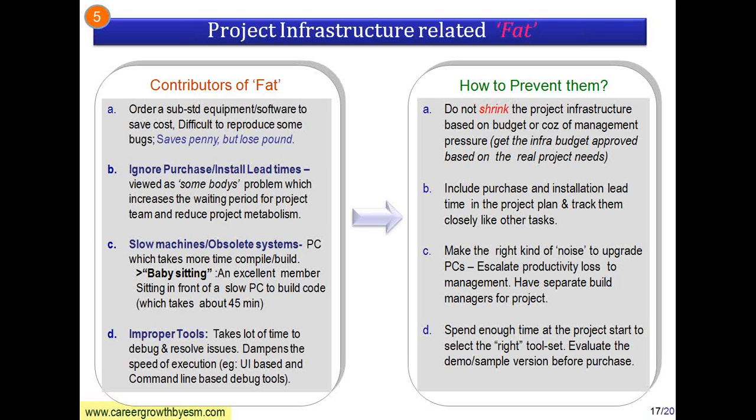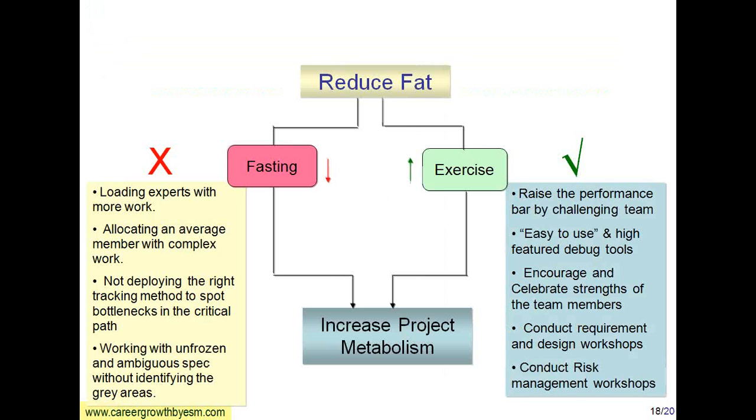Okay, when you are given a substandard infrastructure, what will you do? You have to really escalate. You say that this kind of infrastructure cannot work for this kind of project. If you are giving this kind of infrastructure, then the project timeline, the quality or the effort is going to be this much. So give an impact of what happens if you use this kind of infrastructure.